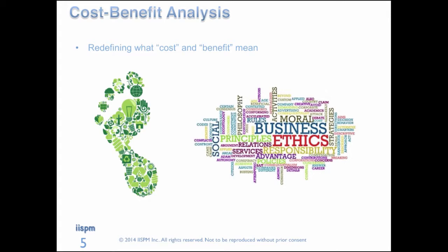It's very common for every organization to expect some type of cost-benefit analysis, but the most common approach to cost-benefit analysis is to do some simple financial assessments. So what's the expected time for us to get our money back? What's the profit margin that we're going to make on this? What is the net present value, so future value of our money? If we're comparing one project to another, do we have a higher future value of money from one project over another project to help us select one project over another, and so forth and so on.